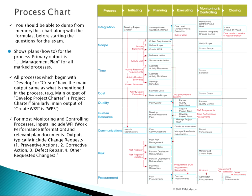So under monitoring and controlling, that's for any type of change request that's put in through a company. A project might be somebody changing out a server within a data center within a company. That can be considered a project in every aspect, from deciding which server to purchase, to the procurement portion, the planning section, everything all the way to installing and testing. After that, there's the time period that you might wait to see that everything is okay, closing out all the paperwork, making sure all invoices are paid, and then finally closing the project itself.